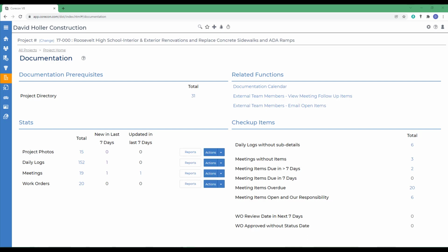It can also be used to accumulate information that would eventually become a change order. A work order can also be used to accumulate information in preparation for a back charge to a subcontractor. No matter which scenario you choose, both estimated and actual costs can be tracked. Depending on the contract type, wizards are also available to transfer the financial details to a prime contract change order, a subcontract change order, or a prime contract invoice, eliminating duplicate data entry.